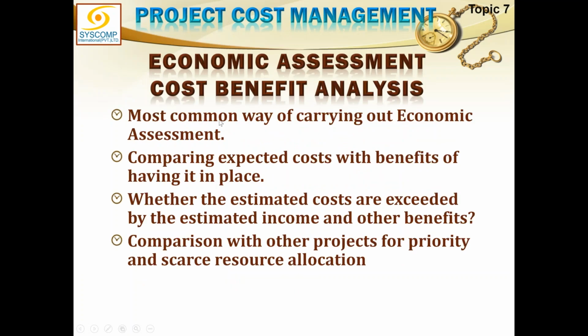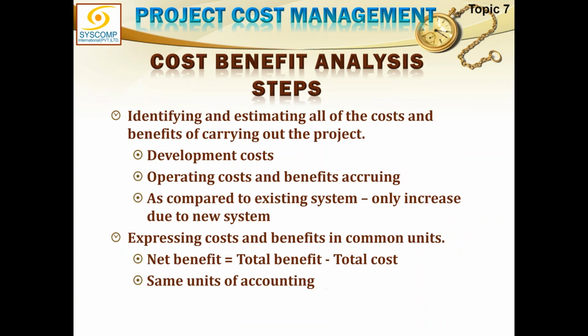Okay, can you see that? Yes, economic assessment, cost benefit analysis. Naturally, there are so many slides there, but I'm not going to cover all of them. But you can see here we have all the costs which we will be spending on this initiative, that is the investment, and all the benefits which will be coming out of it. So if I sum up all the costs and all the benefits, then the net benefit or net profit would be total benefits minus total cost.